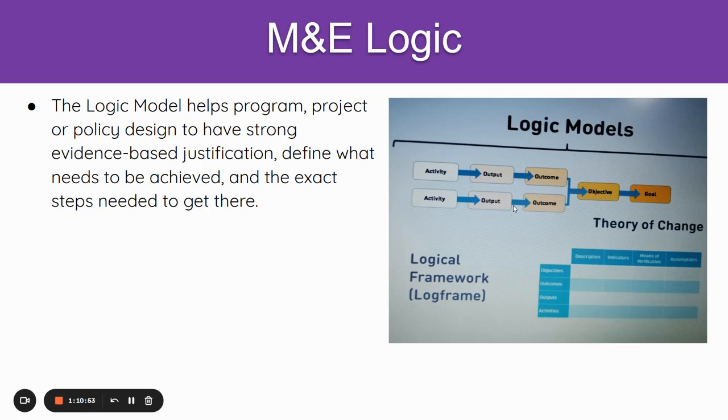But what we want to do is, we already have a clear picture. Let's say we have an inhabitant of 50 members in the community. Out of that 50, we realize that about 30 of them are using the hand pump, while 20 are not using the hand pump otherwise. So the number of people who are using the hand pump is an indicator that shows increased access.